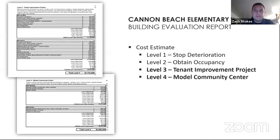Yeah. And anticipating a seismic retrofit, if you want to do the roof first, you can go in and just re-nail the diaphragm without doing a full seismic retrofit when you do the roof replacement. And the roof that we're talking about is the one over the classrooms. We're not really having a roof leak problem in the gym, correct, Karen? We have walls we can see through, and there have been leaks on the floor and things like that, but the classroom is the one that's really impacting us right now.